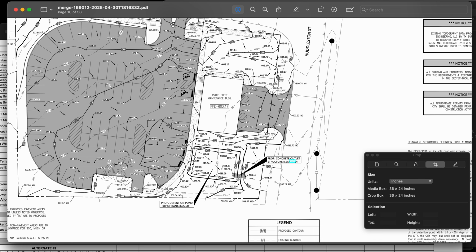But instead of including all of the cubic yards of cut and all of this and all of that, we excluded the price for export, but we included the price of losing it somewhere in its proximity, and we also included the price of cutting the soil. So as long as there's areas to put the soil, you just factor that into your price. Maybe go up $1 or $2 to cover the cost of moving the dirt maybe another 100 feet to another lot or another area where they can use it.